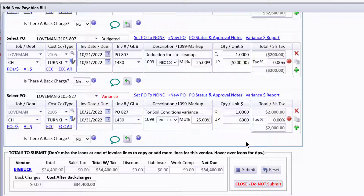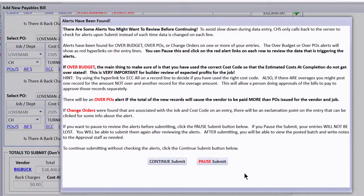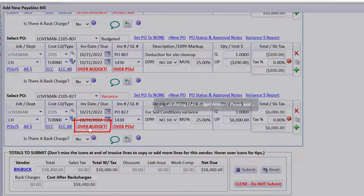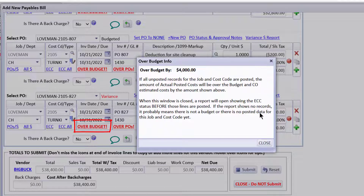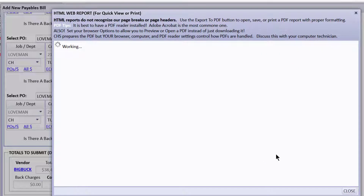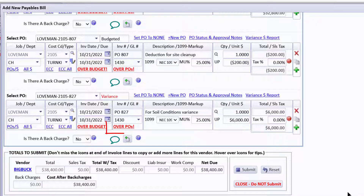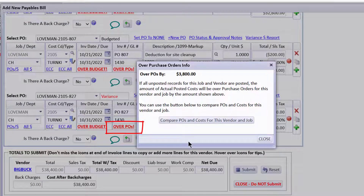What if I put $6,000 here and submit? We get a warning that it's over budget — it might be over POs or change orders. Right now it's telling me over budget by $4,000 with everything on here, and it shows me I'm about to post $38,400. It also shows the ECC we've been looking at, and warns me that I'm over all the POs that have been issued to Big Buck. Let's put this back to $2,000.